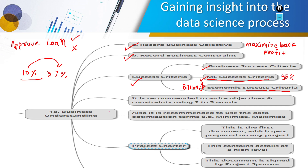In this way we have the content related with business understanding. It is recommended to write objective and constraint using two to three words or a short sentence, using words like 'minimize' or 'maximize'. After finalizing this business understanding, the first document created is called the project charter — similar to a service level agreement (SLA). Before starting the project, the team, domain experts, and client agree on certain terms and conditions, which is the project charter.